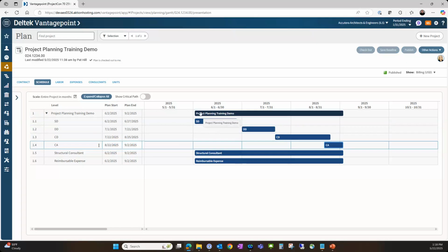If you're setting up your project, and initially before you save that project, when you're first setting it up, and you set your estimated start date and your estimated completion date within your milestones, it will set the whole plan to those dates. So everything would come in and they would all be this length. Then you can come through here and you can see at the end of the row, if I get my hand close enough, there's a black arrow left and right that I can collapse and expand, right?